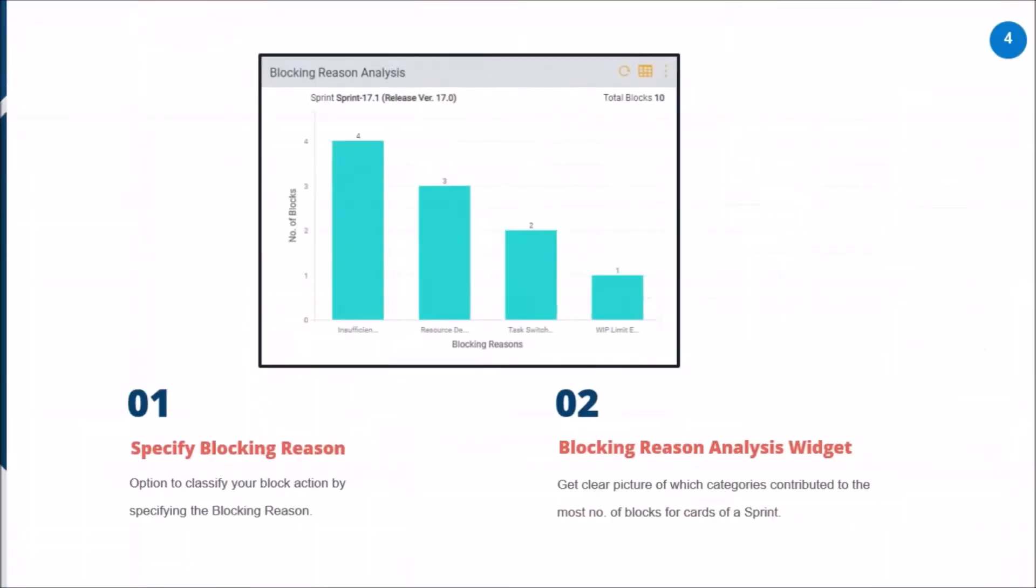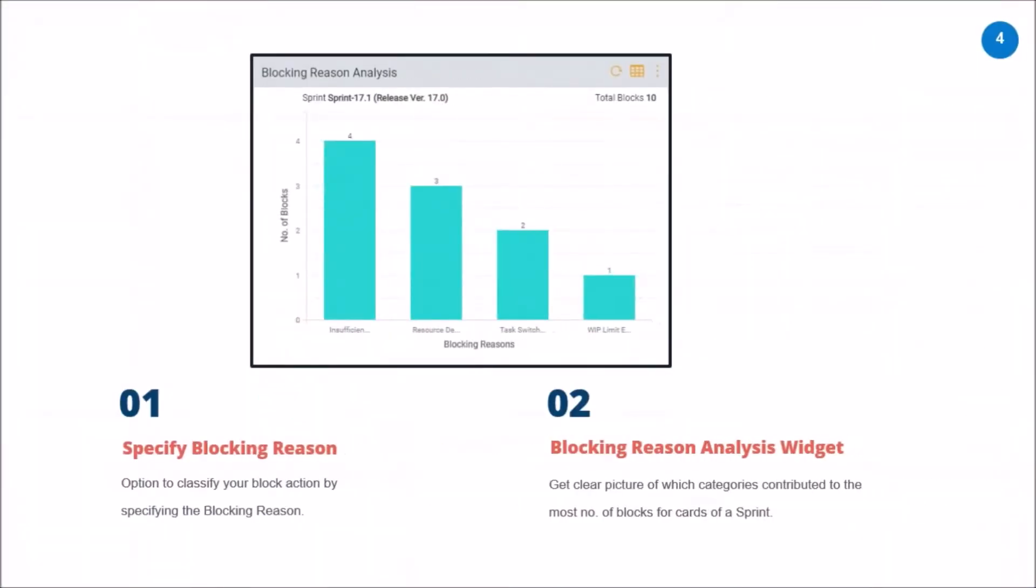What we looked at is how you can quickly classify cards which are getting blocked while you are working on them during the execution of a sprint. You can give a classification reason and also allow analysis to happen on it at a later stage so that you can improve your processes for better efficiency.